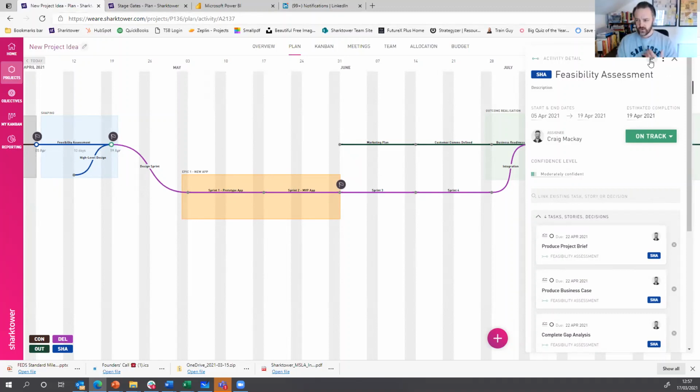And the key thing is also all our risks and issues. If I raise a risk or issue here, it's related to the work I'm doing, which is related to the outcome I'm doing, which is related to the business objective. Again, we're not creating separate logs of information. It's all about creating everything connected. So if I look at the risk, I can see what it's related to, and I can drill back down to it so I can look at different views.